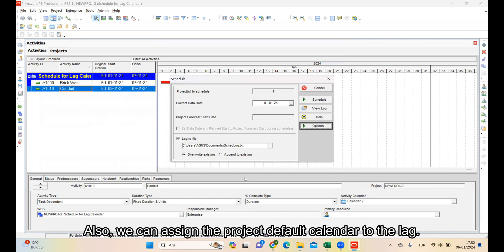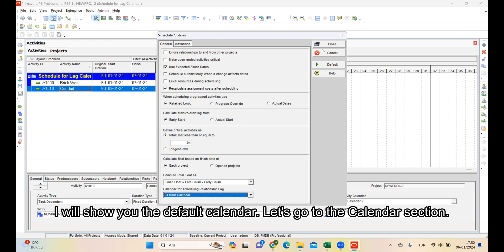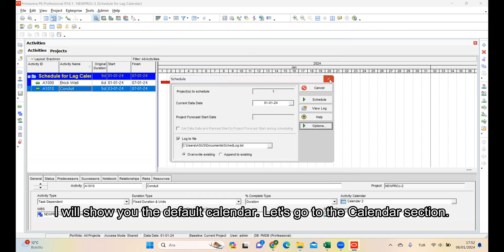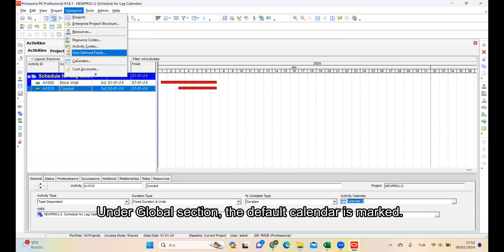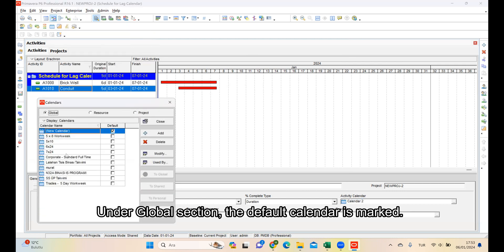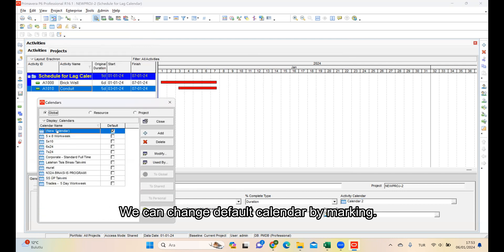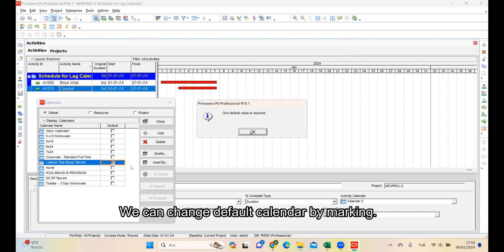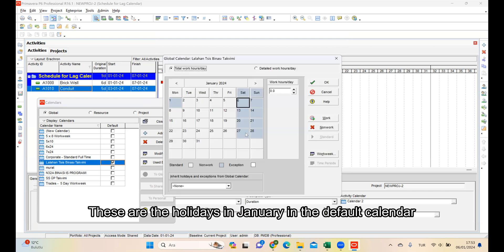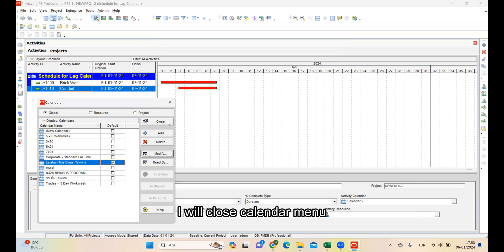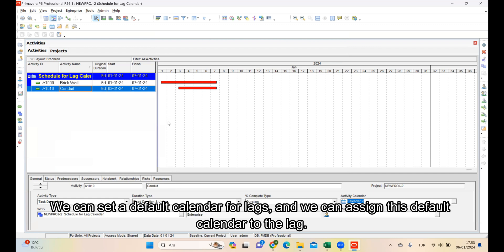Also, you can assign the project default calendar to the lag. I will show you the default calendar. Let's go to the calendar section. Under the Global section, the default calendar is marked. We can change the default calendar by marking like this. These are the holidays in January in the default calendar. I will close the calendar menu. We can set a default calendar for lags and assign this default calendar to the lag.